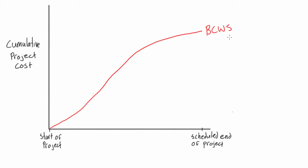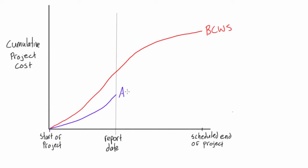From the last video we were talking about report dates, where we had the budgeted cost of work performed and the actual cost of work performed. Let's say we have some arbitrary point along our project as a report date. Not only do we have BCWS, but we'll have the actual cost of work performed — it might not always be exactly what we had planned. We also get one other value from our field reports: the budgeted cost of work performed.